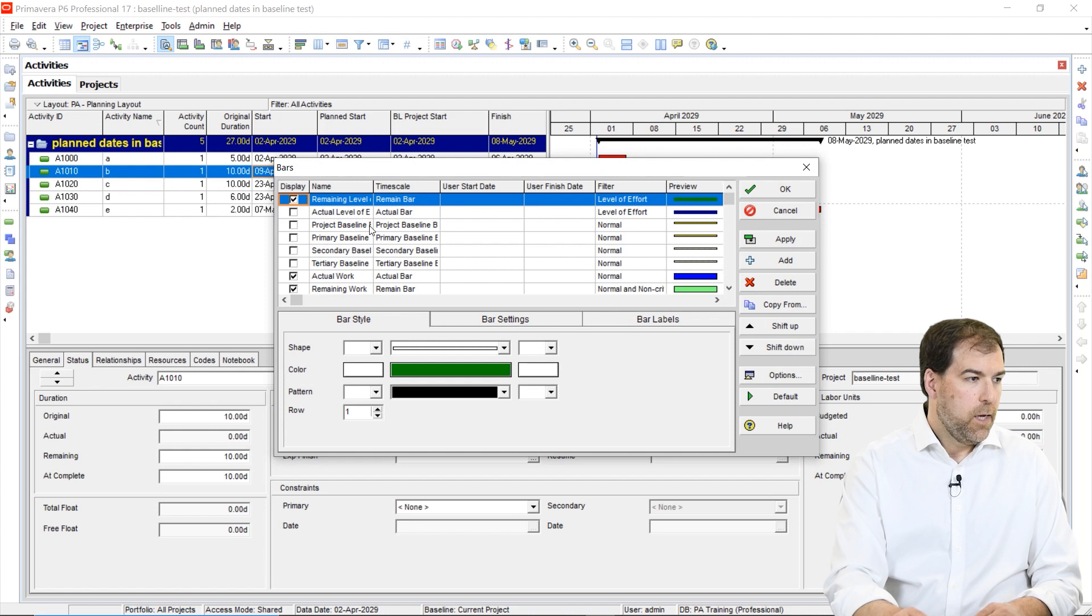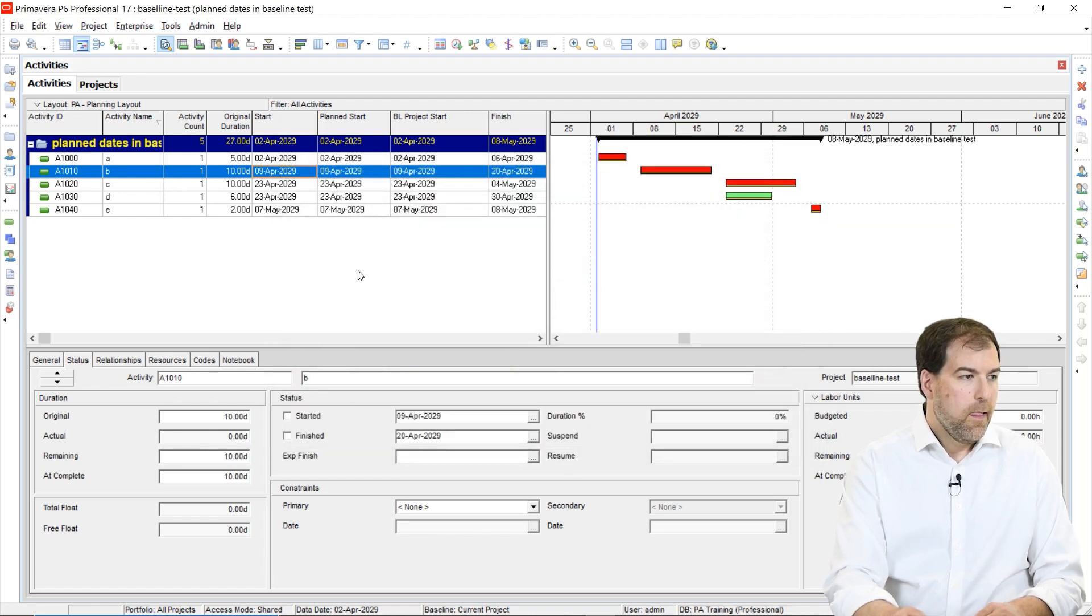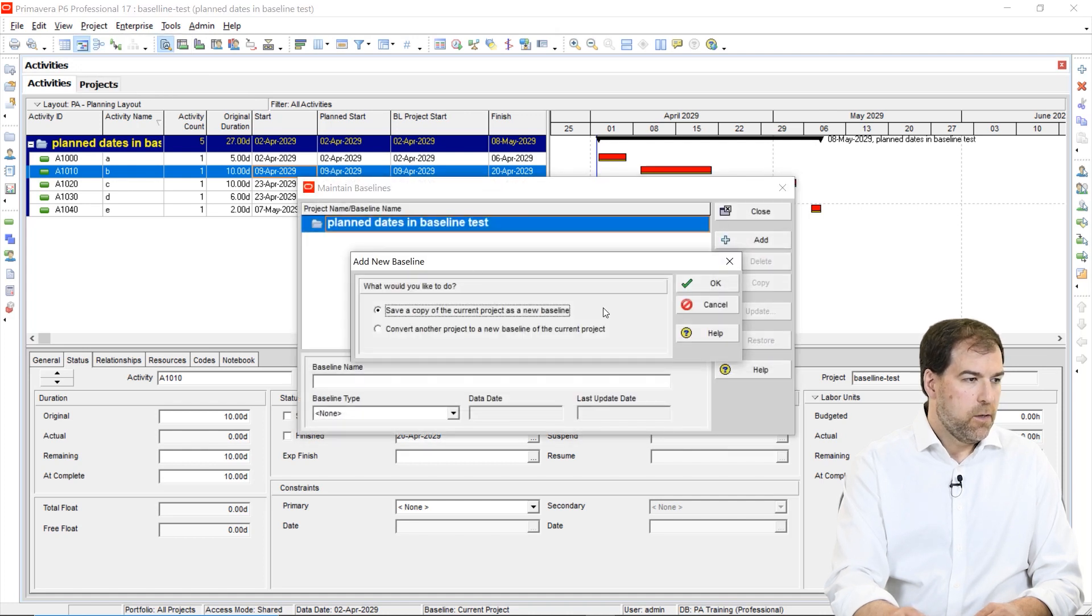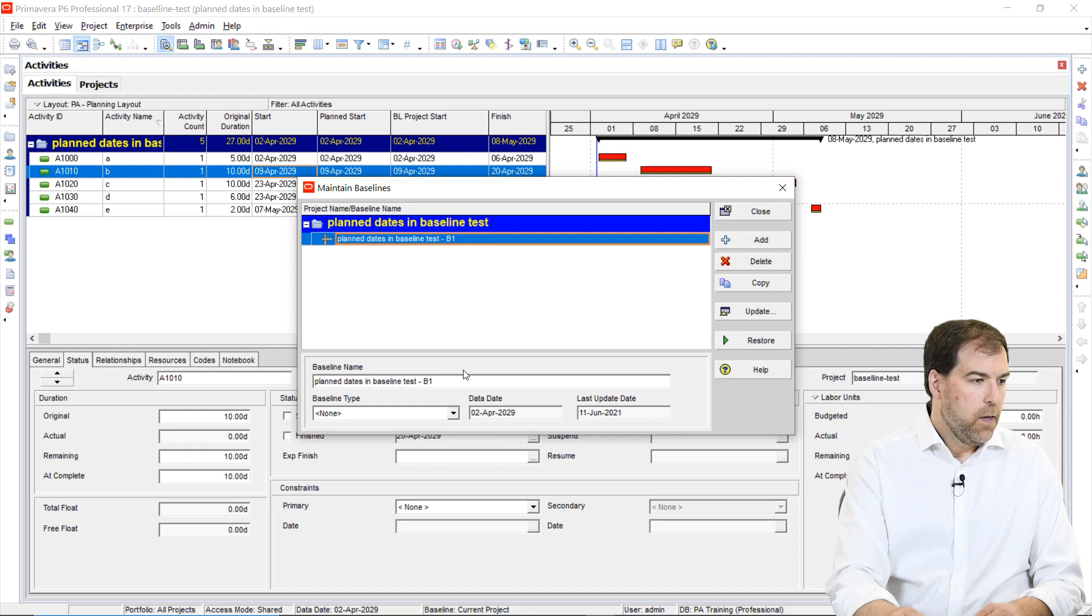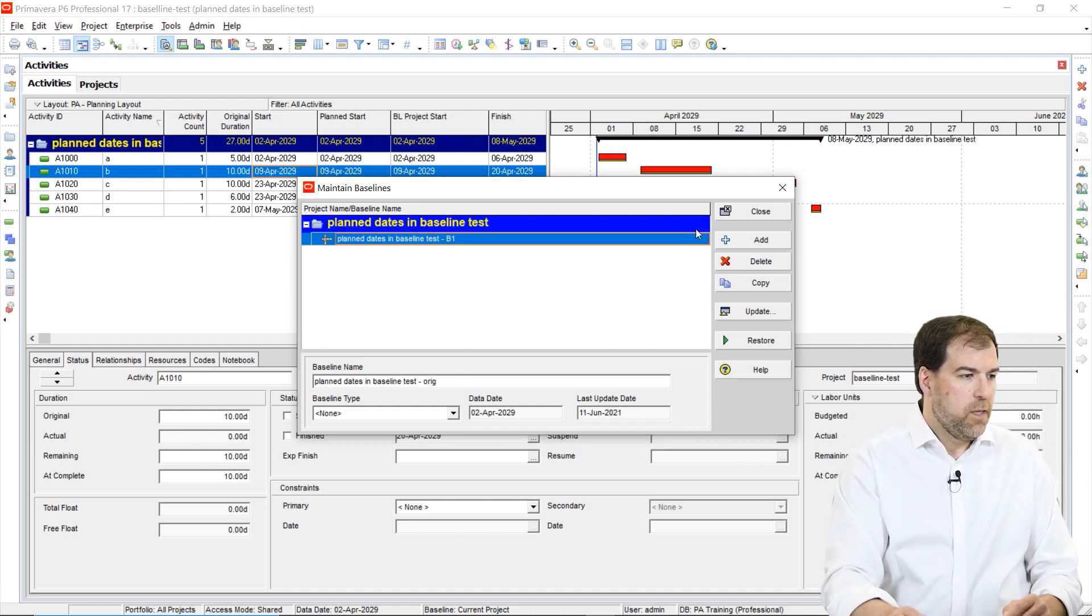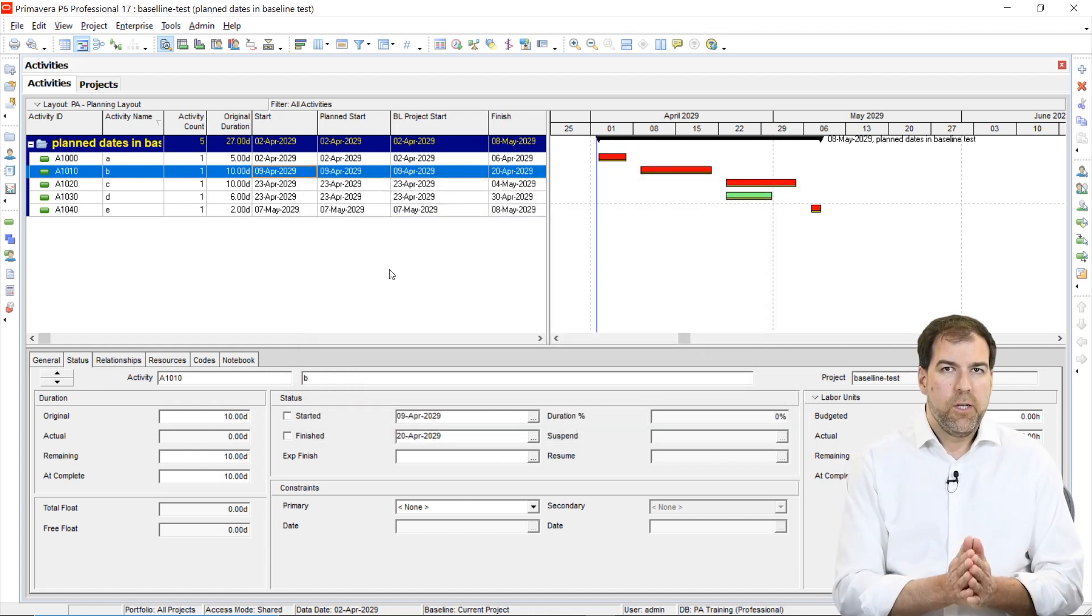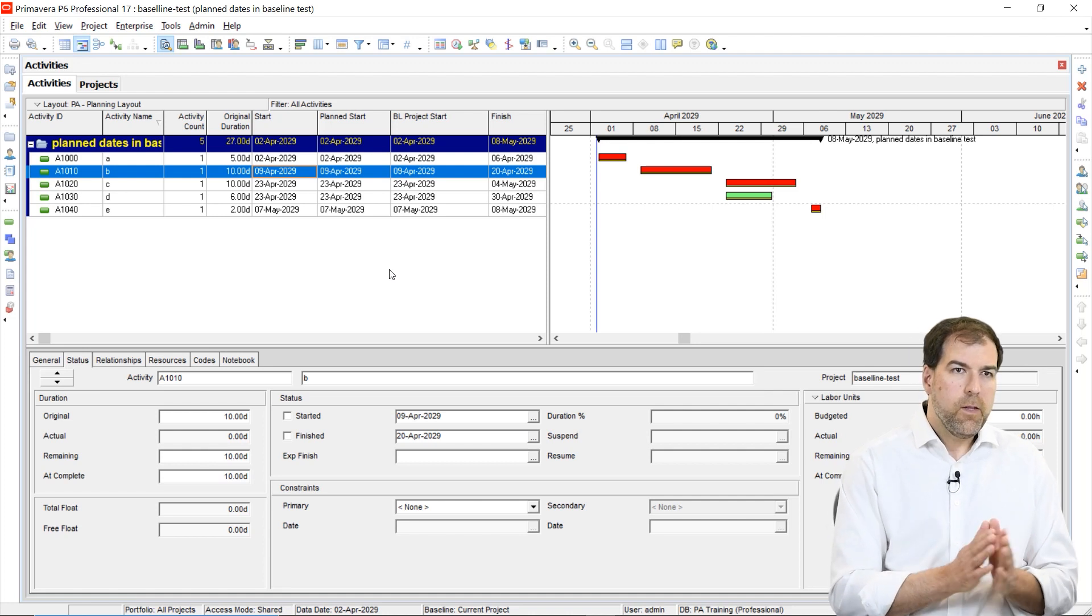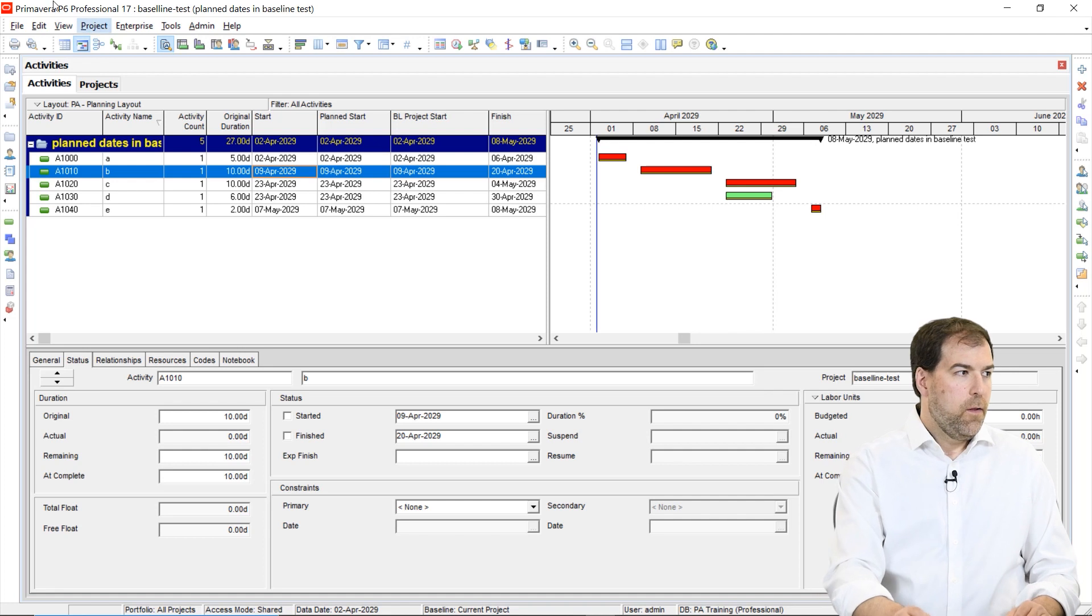What I want to do first is I want to get my baseline bars up here on the screen. So let's go to bars and I'm just using the project baseline bars. We'll just turn those guys on and simple five line schedule. Let's go ahead and baseline it. So let's go to maintain baselines, add our baseline here. And I'm going to call this instead of B1, I'm going to call it original. But again, you understand that we would do better documentation in the real world and we're just doing some example stuff here.